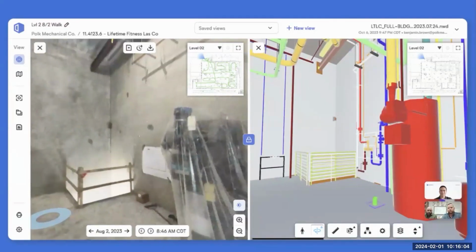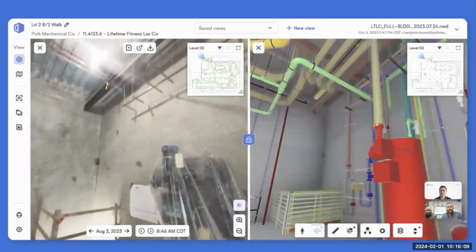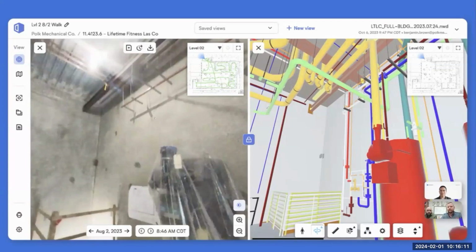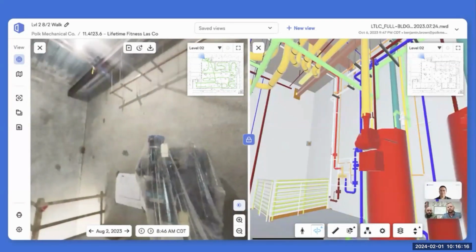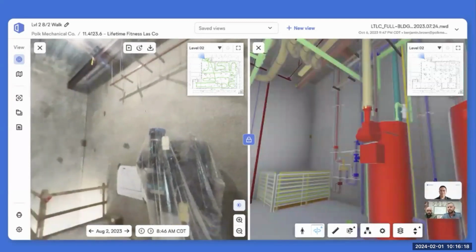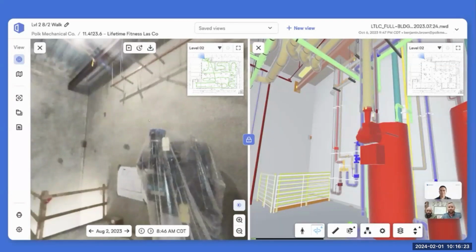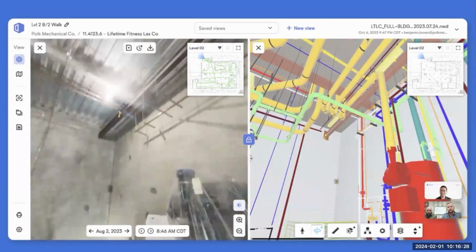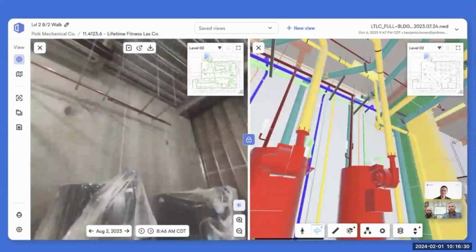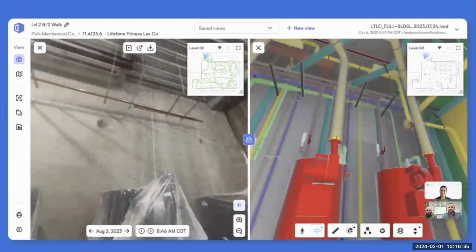Yeah, as you're looking at this room, great example. This was back in August, before we did almost all the rough end of this mechanical room. You can see here, if Brandon as a general superintendent over this job was walking it going, guys, level 2 mechanical room, y'all are telling me we've spent 50% of our hours. And he's looking around here and he's like, we don't have natural gas. We don't have duct. We don't have fluid. We've only set equipment. I don't see any water piping here besides a couple sticks of copper. We've got a ton of work to do, right? That probably wasn't the case, but if it is, you get that idea of like, guys, we got a problem. Y'all have been charging this code for a week and I can't see any production getting done.